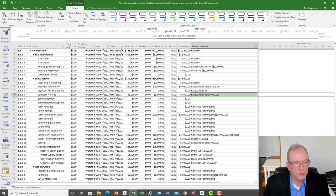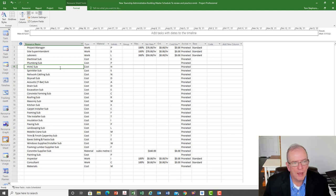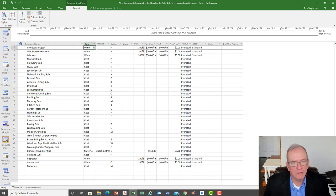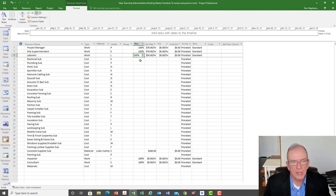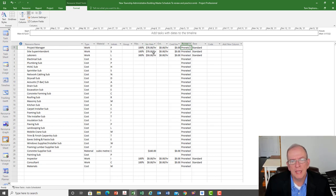We would have had to pre-define who the resources are on this project — who we're contracting with. We might have the HVAC sub, sprinkler sub, network cabling sub, and others, as well as our own forces like a project manager, superintendent, and laborers. For resources paid regularly, like our own employees, we have three choices: pay at the start, prorated, or at the end. For a year-long project, prorated — paying as work proceeds — makes the most sense.